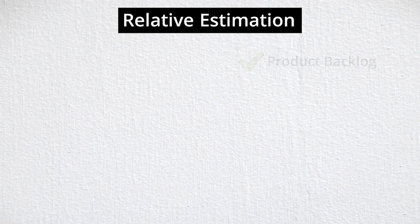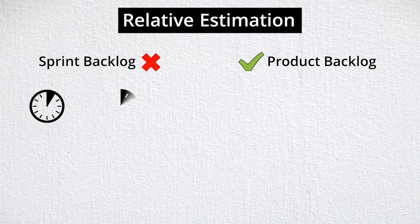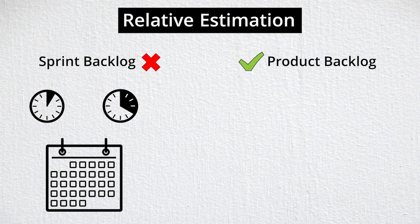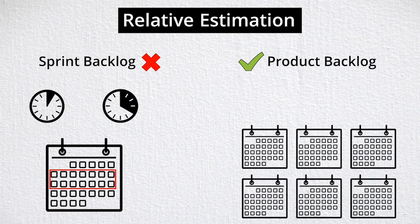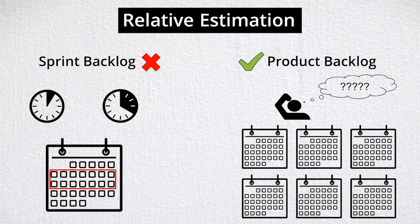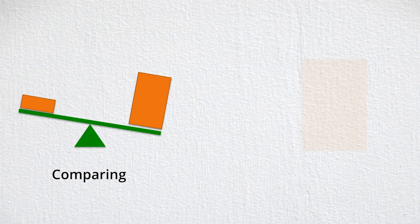Relative estimation is applied at a product backlog level rather than at a sprint backlog level. Sprint backlog items can be estimated in traditional time units such as hours or half-day blocks, primarily because the period of time being estimated for is a single sprint, which is a matter of days rather than months. On the other hand, the product backlog may collectively represent many months of work, making time-based estimation very long and laborious.